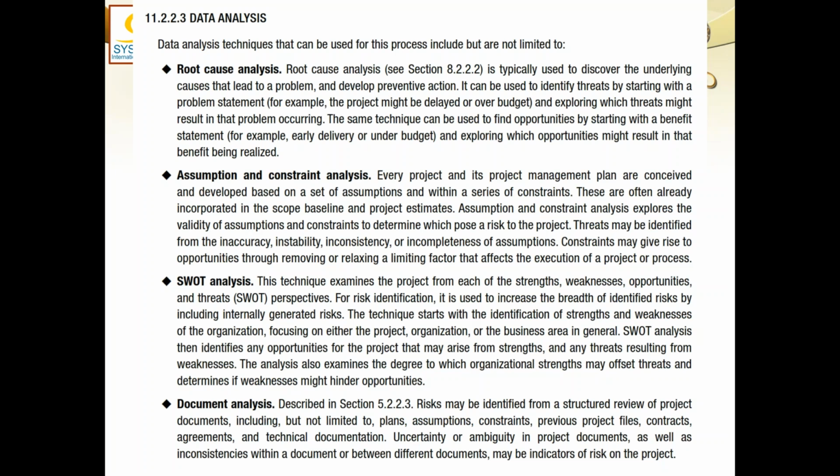Then is the time when you run the analysis. Once all the strengths, weaknesses, opportunities, and threats have been identified, then you compare strengths with weaknesses, opportunities with threats. Strengths with opportunities and weaknesses with threats. Strengths with threats and weaknesses with opportunities. So it is a complete analysis of how each one of these quadrants affects each other. So this is exactly what he defined here. Once you have done that, that would have given rise to a number of opportunities and threats which could be recognized.